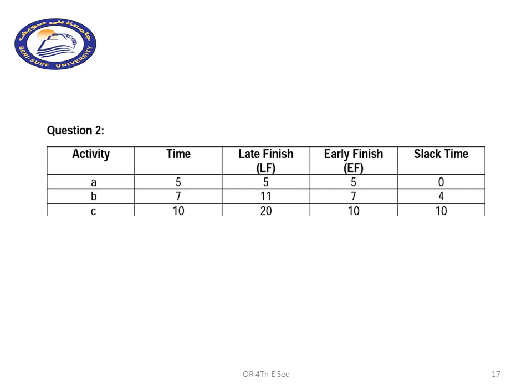And what will be the early finishing time for activity A? Here the early finishing time will represent the earliest possible starting time that is written in a rectangle at the beginning of the activity plus its duration, its time. Here it is 0 plus 5 as well. So this will give us slack time for this activity 0. So this activity is a critical one. Any delay for just 1 week in the start of this activity will make the whole project get delayed by the same time.